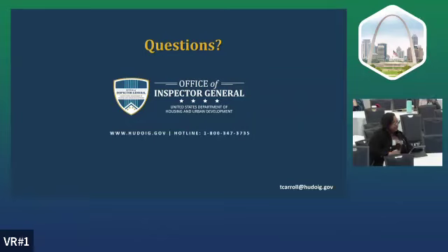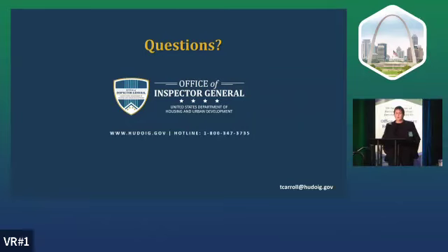All right, contractors. Number one, hopefully if it's a large payment, you actually have a contract division that goes through. So it's going to be things like, what's in that part of the contract? We tend to call that, does it meet the actual scope of work? Are there performance measures? If they're under a percentage of completion, are we only paying 10%? Are we making sure that we keep retainage? There are things like that that you're looking for.